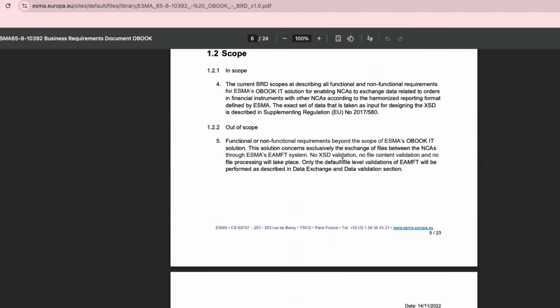To give you a live example, take that AI chatbot project that we are discussing. What will be in scope? In scope means it's available only in English, so the chatbot can reply only in English. It cannot reply in other languages. So in scope, you're going to write the functional and non-functional requirements, and you will also specify that the bot we are creating for Cigna for the member portal will reply to all answers only in English. Anything other than English will be out of scope. Spanish is out of scope. Other languages are out of scope. I'm just giving an example of in scope and out of scope.